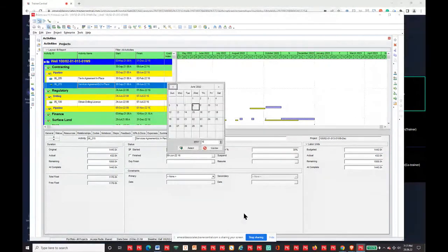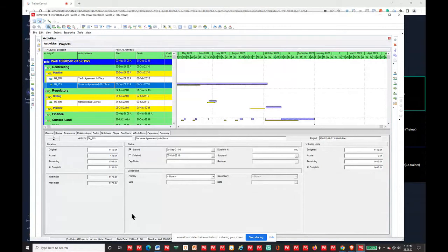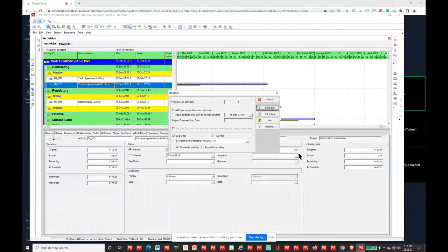So what I want to do here is I have an activity and I've got some update information, and this one has a bit of an issue. They've actually slipped it out a few months. So that's where we're going to select it. And also, of course, when that activity gets extended, what I need to do is reschedule. You'll see that'll end up pushing a few others out, but hey, that is what happens when you start getting some delays in things. So if I schedule this,